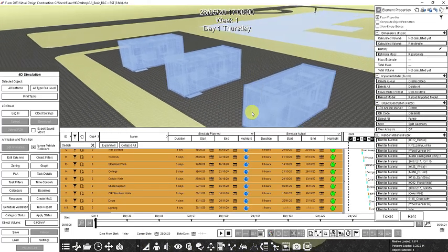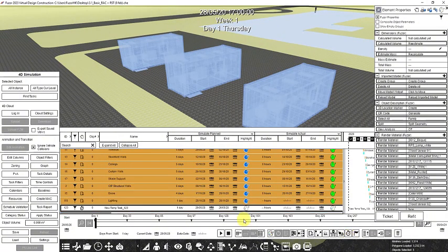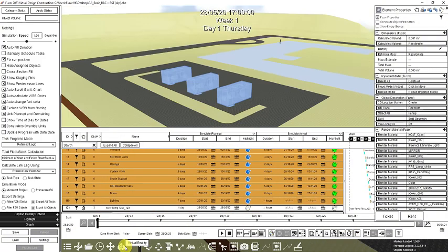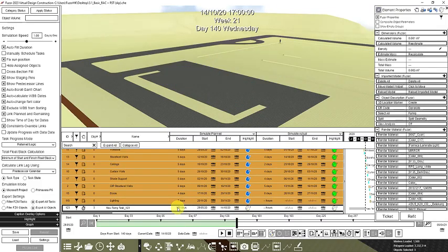So we can add these to the task. Click this icon, create a new temporary task. Then click add selection. So the temporary task is the combination of the construction task and demolition task. First step is we go settings, then autofill duration should be enabled. Then let's change the duration to 100 days. Type 100D, click enter. Right click to unselect.